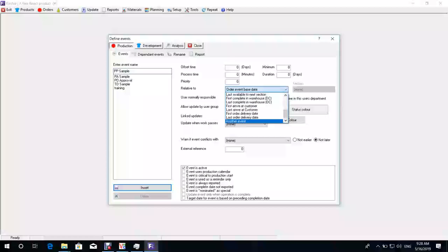When does your PP sample happen in your chain of events? Before production. How many days before production roughly? At least 1 month. A month before production. Not the approval. We submit PP samples before the production by about 1 month. We have to get the approval within 1 week before production.